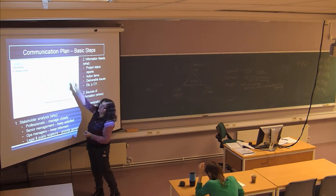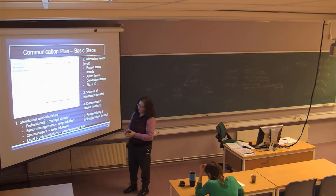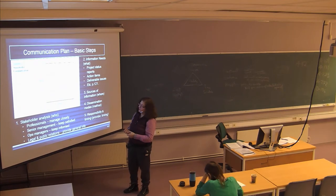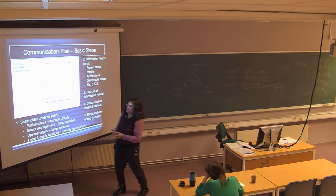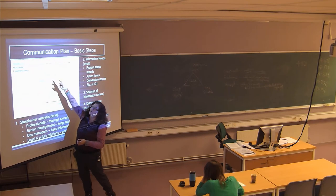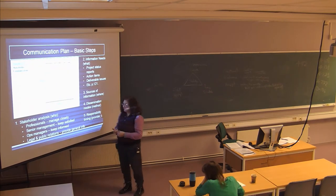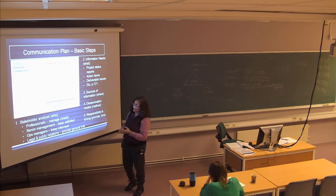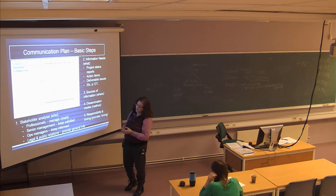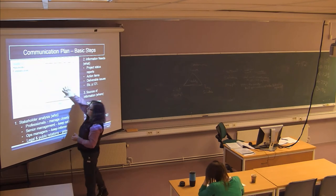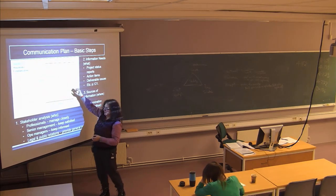So then you would put them in the manage closely sector. And if you have the management, the top senior management of the company, you want to keep them satisfied, but they may not have such interest in the particular project, but they have a lot of power, so you want to keep them satisfied. And then operations managers, which might be the units or line managers within the company, they might not have so much that they have to do. They might be interested in it, but they don't have a lot of power, so they're the line managers. So you need to keep them informed.